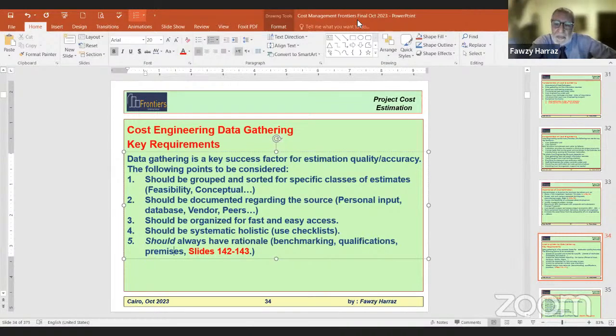Whatever, we have found over the cases, over the practice, that the low bid will not run a healthy project. I mean, a bidder that is 15 or 20% less than the benchmark will not complete the project. You will maybe finish 40% or 50% of the project, but then the project will stand still and fail. And you will have to run into the suspension and termination scenario. This takes maybe 6 months to agree, assess the work, assess the remaining work, negotiate with the number 2 bidder, and agree and mobilize. It takes minimum 6 months.